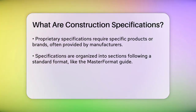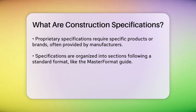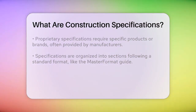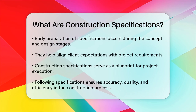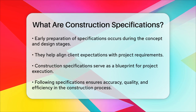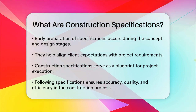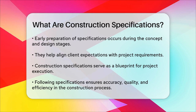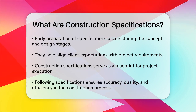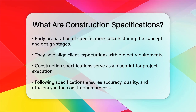Specifications are usually organized into sections that follow a standard format, such as the Master Format Guide set by the Construction Specification Institute. This helps ensure that all stakeholders can easily find the information they need, whether it's about materials, installation methods, or testing requirements. These documents are prepared early in the project lifecycle, often during the concept and design stages, helping to align client expectations with project requirements and ensuring that everyone involved is on the same page.